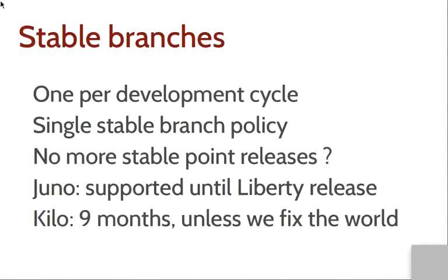What makes the final release different is that we'll have a stable branch out of it, meaning we'll maintain a branch where we can push backports of important bug fixes and vulnerabilities. Only this final release of the Liberty Cycle will be supported like this — if you install intermediary releases, you don't have the additional comfort of a stable branch for critical bug fixes. There will only be one stable branch per development cycle. We also have a single stable branch policy across them, with a team ensuring that only appropriate fixes are merged — we don't break backwards compatibility, don't add new configuration options or features, and don't change the database structure.